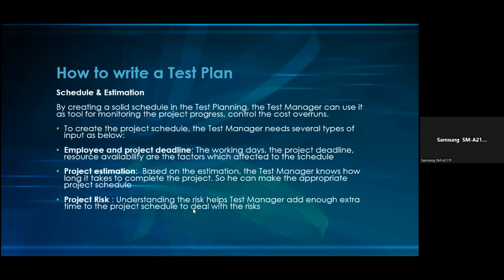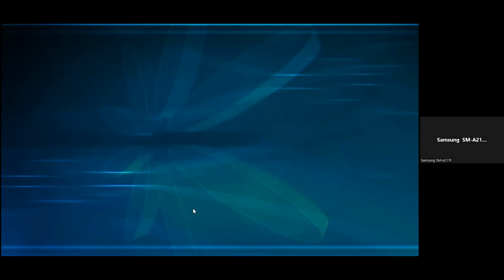Please, mute, please. Project risk. Understanding the risk helps the test manager add enough extra time to the project schedule to deal with the risk. So if we understand the risk earlier, it will be an advantage for us.